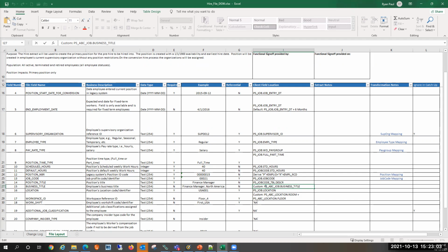But from the timeline perspective, it sounds like it's going to add to the timeline, because now there's this new task where you have to either consume the feed from the vendor or do a different kind of mapping. But if you're consuming the feed from the vendor, some of these softwares have, I'm going to say, integration partners, in the sense that they have pre-built integrations, right? So that can help streamline that effort.